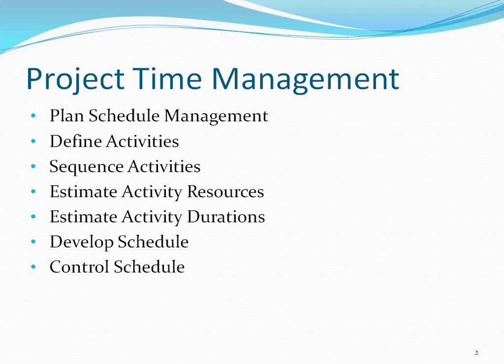I told there will be 3 types of baseline: scope baseline, schedule baseline, and cost baseline. They are nothing but what you have planned related to the scope to do. Schedule baseline is the time when you want to complete it. Cost baseline is basically the budget you have agreed, against which you always do the management. You try to make sure that you are meeting the baselines. So similarly here also, pertaining to schedule, you have to control the schedule.